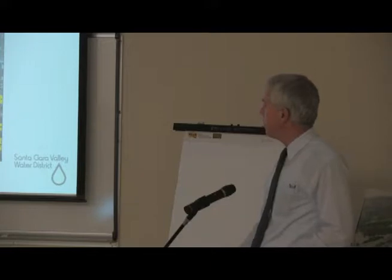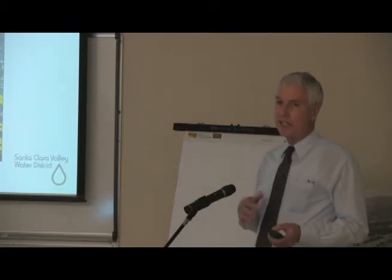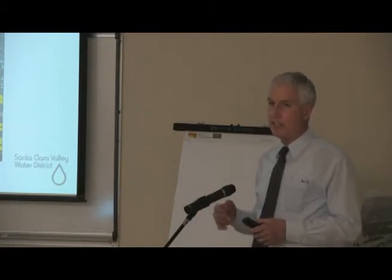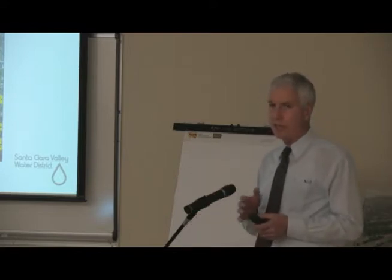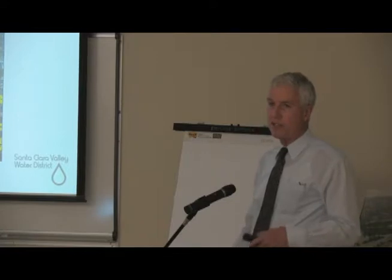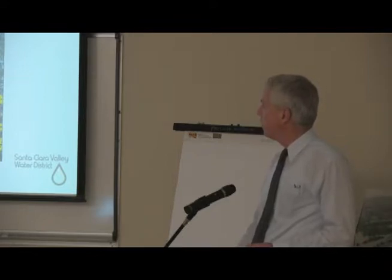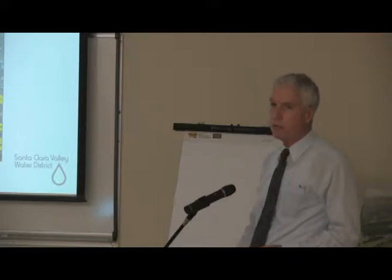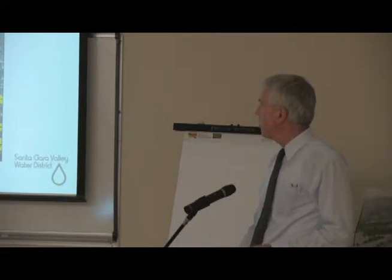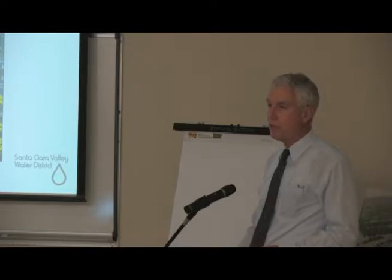One of the ways you map faults like this is you look at aerial photographs and you look for the difference between 1930 and 1950 and 1980 and the current year, and you can see little places where things have changed, and you can kind of draw lines between them and interpolate and extrapolate where these faults are. And then we go back, and there are investigations that have occurred for building construction where some subsurface information is available. The county is really involved in this a lot because it affects building permits and construction all over the area. So we work with the county and the town of Los Gatos to review the work we're doing and to share work with them, and they share work with us.